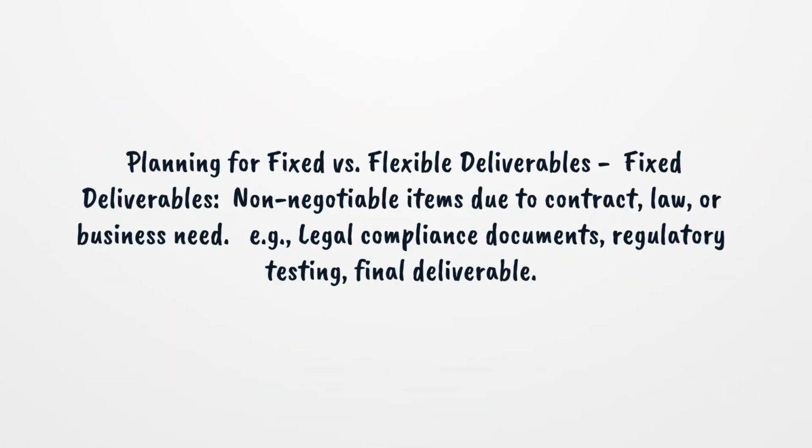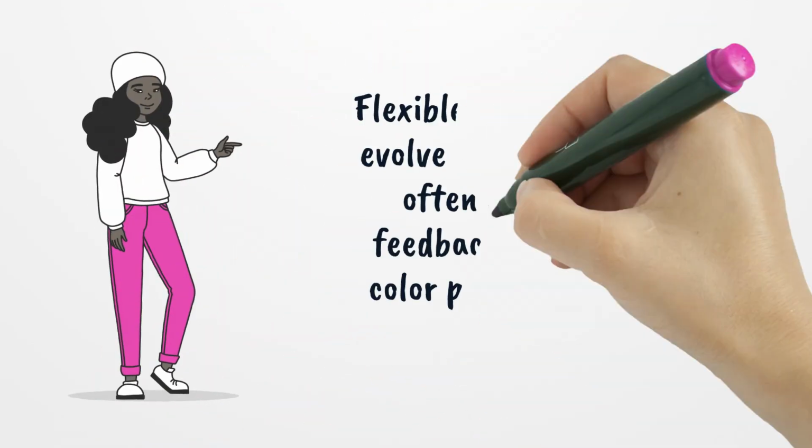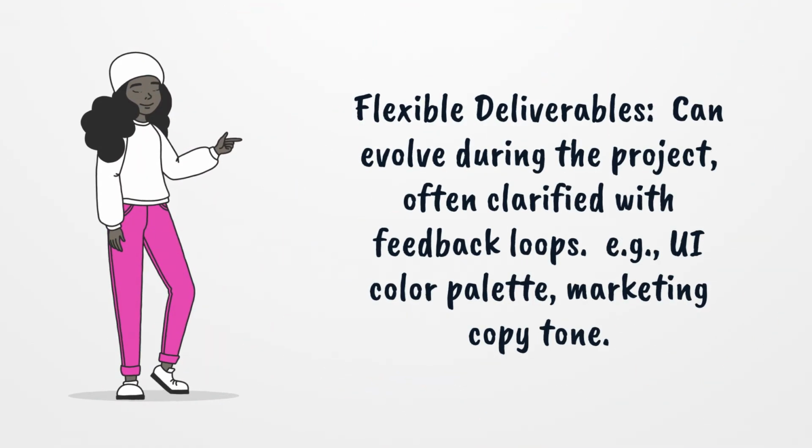Planning for fixed versus flexible deliverables. Fixed deliverables are non-negotiable items due to contract, law, or business need, e.g., legal compliance documents, regulatory testing, final deliverable. Flexible deliverables can evolve during the project, often clarified with feedback loops, e.g., UI color palette, marketing copy tone.